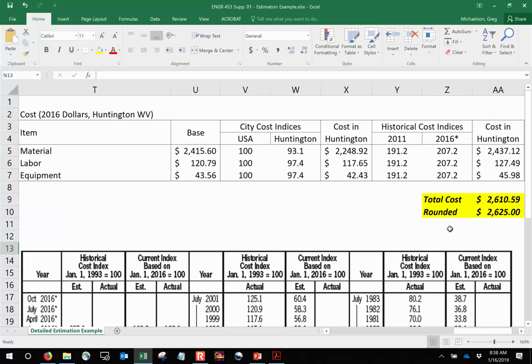It's not that uncommon in the bridge sector to express costs of bridges in general as cost per square foot. That's very common. So for instance, if you have a bridge that's 40 foot long and 24 foot wide, how much does that bridge cost per square foot? That's a very common expression in the bridge industry. Then it just depends on what you're looking at. For route or linear type projects, expressing them in linear feet can make sense, but for area and earthwork projects, expressing those in square feet makes sense as well.